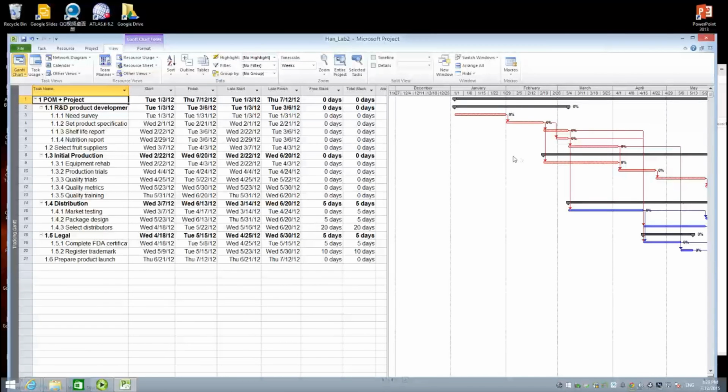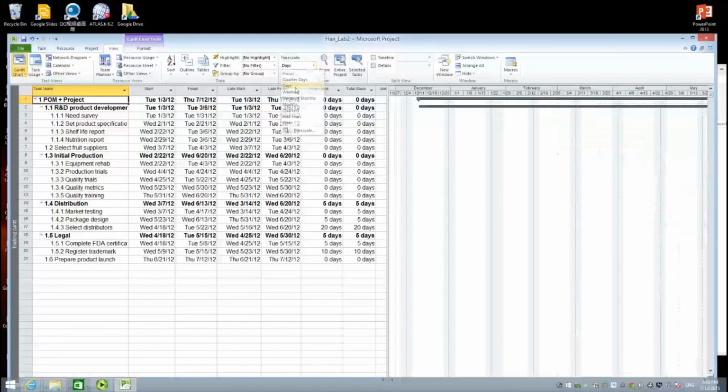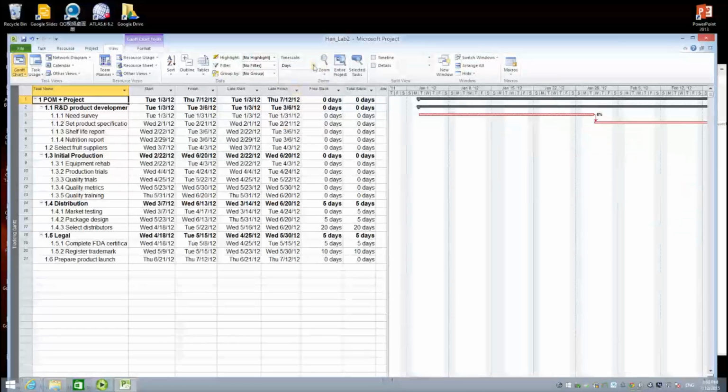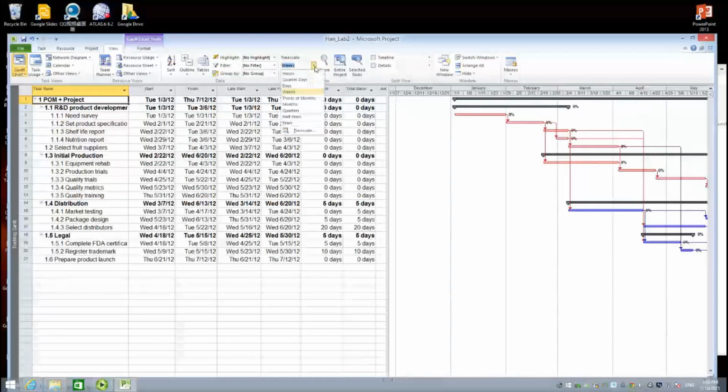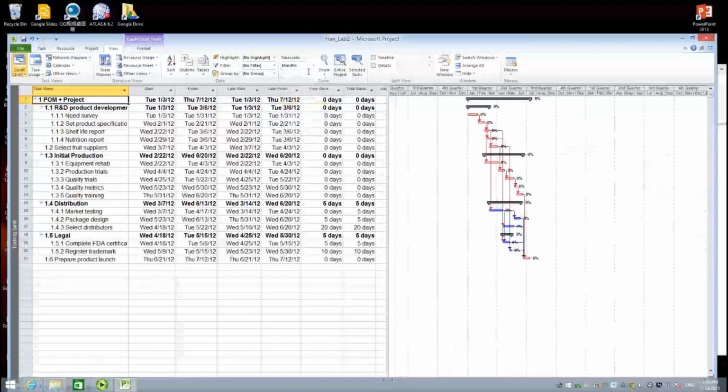Okay, question 4. Assume the project is resource constrained and try to resolve any resource allocation problems by leveling outside of Slack. What happens? If the project is resource constrained, it means that we have to schedule the project based on the current availability of limited resources we have, and we may have to accept an extended timeline.